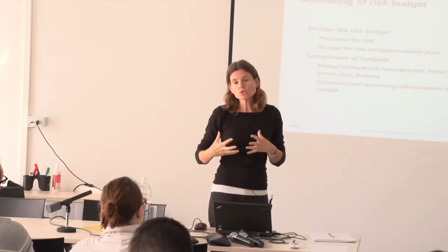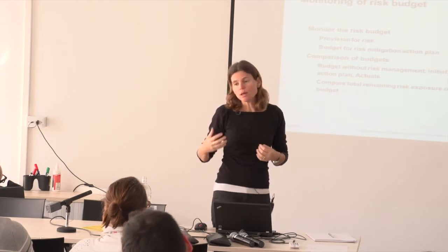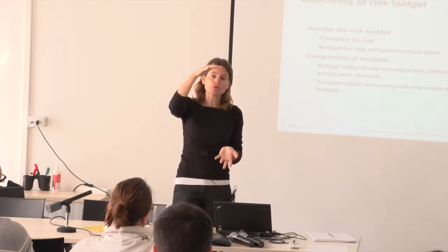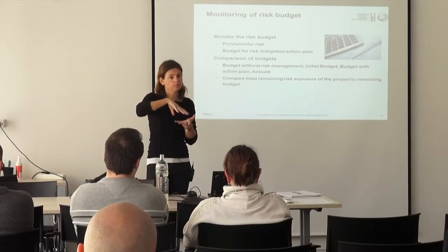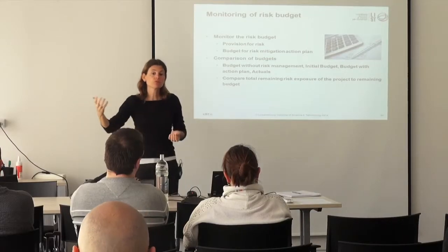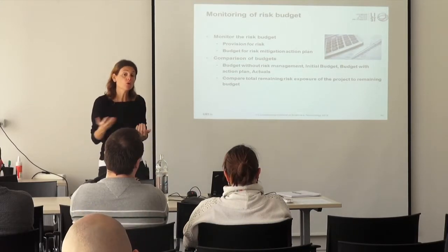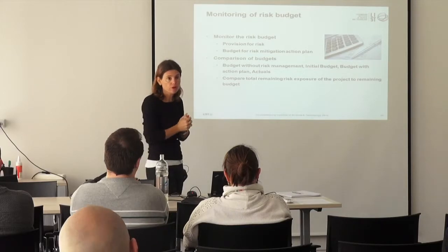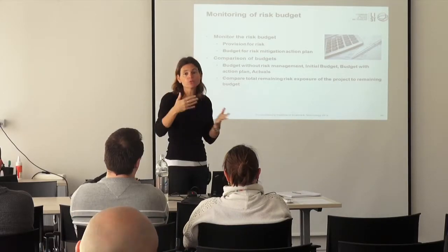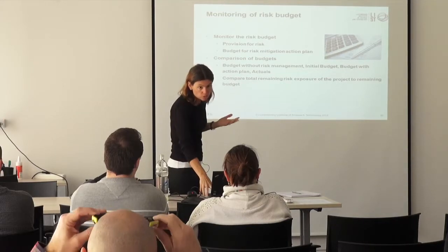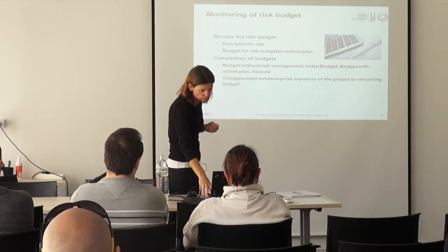Yeah, so if you want to work with exposure, then you should compare your total project exposure to risk in money with the remaining budget that you have, and it should be lower than the remaining budget you have for risks. Otherwise, you are not able to cover all the potential cost of the risks that you have identified.